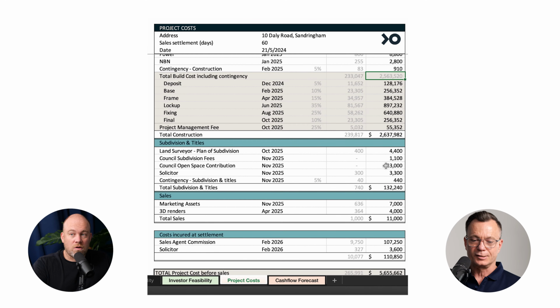So basically, in simple terms, it's only applicable when you've got 3 or more dwellings. So if you're doing a side-by-side, it's just a 0. You don't have to worry about it. And the rule is essentially, and it may vary between councils, but from what I've witnessed, it's pretty much the same everywhere you go. It's 5% of the value of the land at the time of the subdivision. Now, you're just forecasting that, really, aren't you? So what it is based on, and I guess the best indicator, is your State Revenue Office does a land assessment. Yeah, the valuation. Yeah, that's right. So you can go from that.